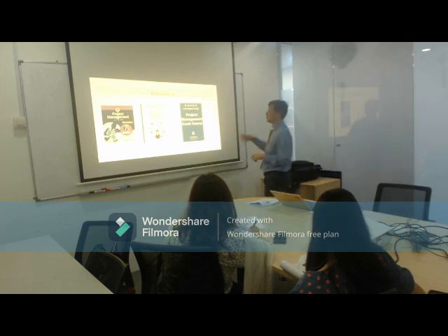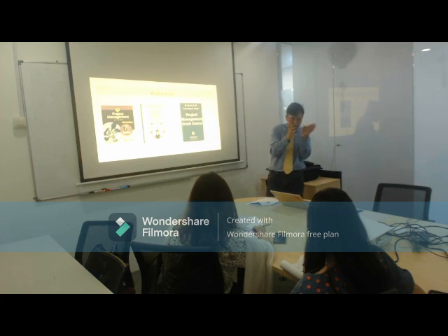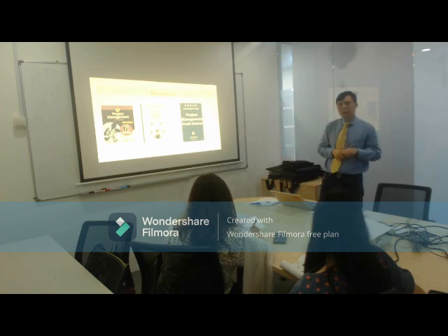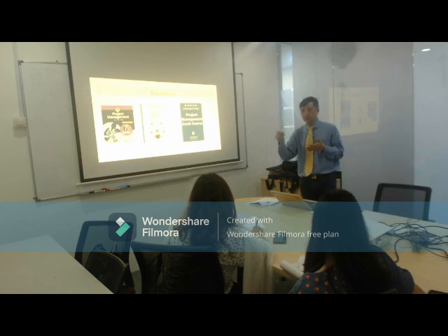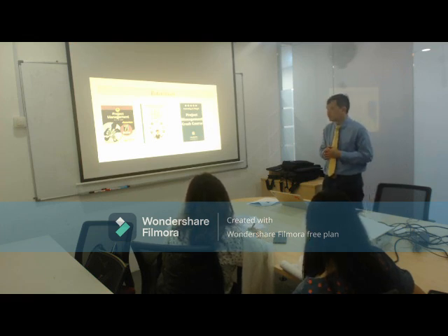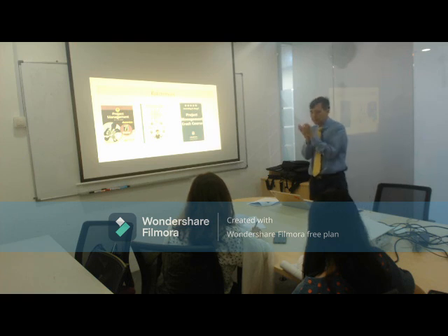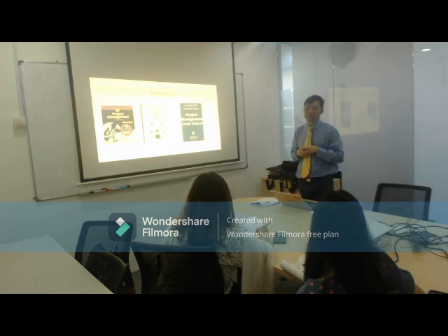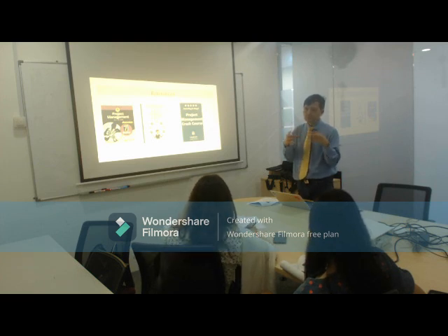Execution is normally taking your timeline, your Gantt chart, and updating it periodically. You record your meeting minutes. You have expenditures, where you buy things, return things and all that. All those things you have to record. Those are the things in your execute. There are many things in execute. You may also have something called a work breakdown structure, which you will see at another time. It will say that a sub-activity, a subtask, is completed.